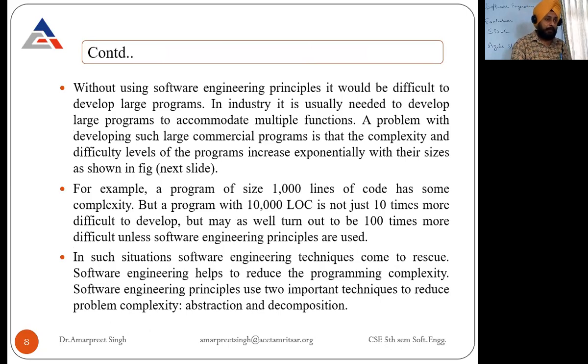These are large products. And one thing more: the scalability factor and the size. Just see the example. If the size of a product is 1000 lines of code, but a program with 10,000 LOCs is needed, it is 10 times the size, but the effort and difficulty is not 10 times. If the size of the software increases, the relation between the effort and time to develop is not in the same multiple, but in an exponential manner.